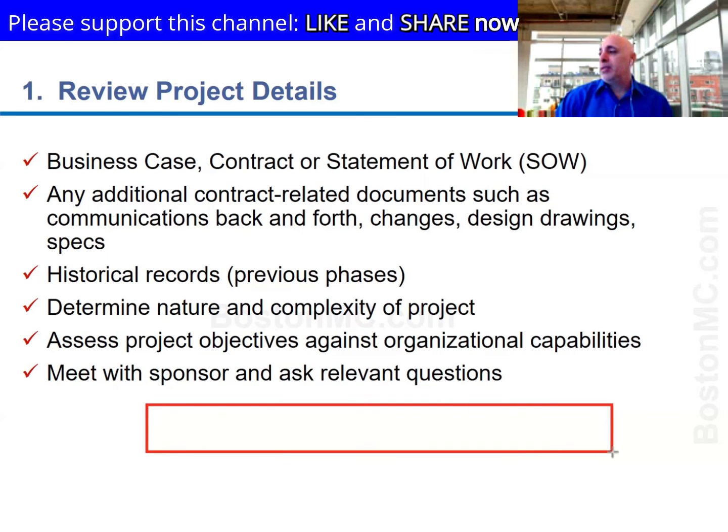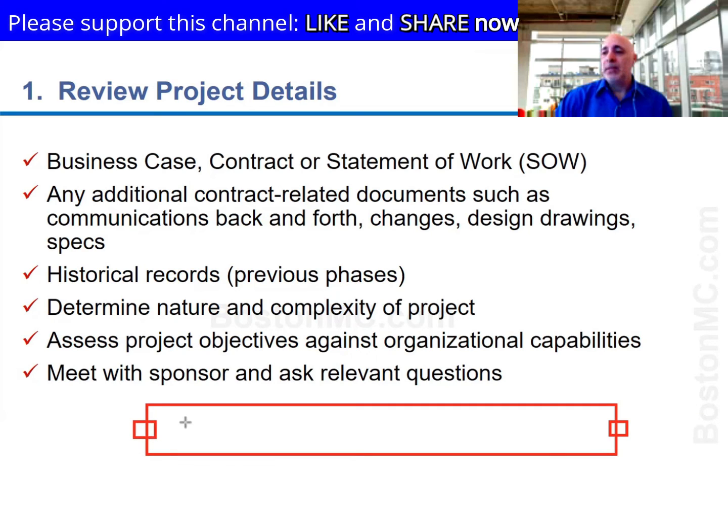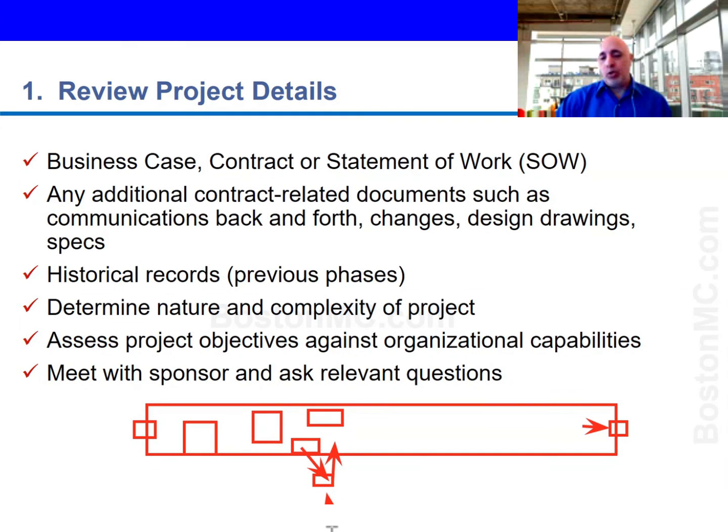If this is your organization's vision, if this is where they want to get to, and this is where they are, some activities have to happen along the way, like this. And let's say somebody wants to add an activity here, but you feel that if you work on this one activity, you're going to have to go off track and then go right back here. And by doing so, you're going to lose time from achieving your goal here at the end. Then I'll say this activity down here is not strategically aligned. It is not strategically aligned if it distracts you from getting to your end result, your vision.